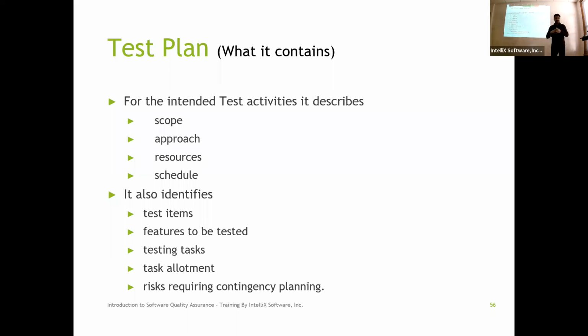Right? Now you have 3 weeks worth of work. Are you going to cram it into 1 week? You have to figure out what the plan is, what the risk is, right? You can say, hey, you know what, there are two choices. I can still do it in 1 week, but instead of doing all the testing, I'll do only this part of the testing. And then you'll have to take a risk with not fully tested software deployed in production.